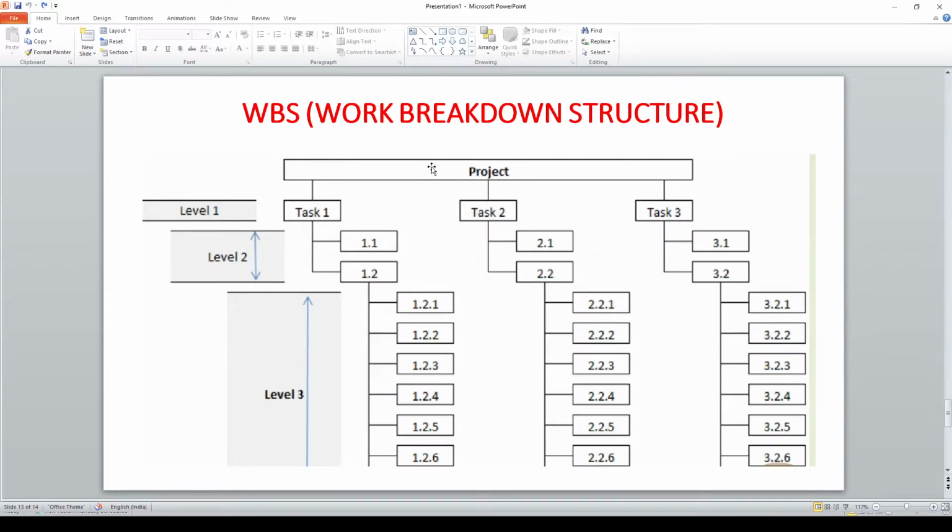So this is task WBS. You can give tasks in one particular structure. Now I give this as the Hill Valley project. Here you give substructure. Under substructure you have PCC, excavation, and then plinth beam, columns, and these will be sub tasks.